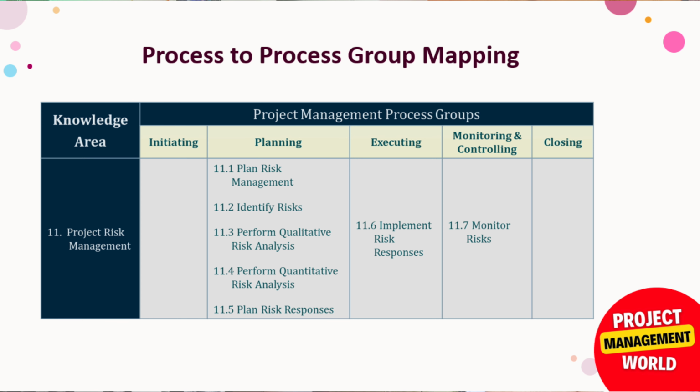So all these things we put into that plan, which is called the risk management plan. So this second process, we list out all the risks, we identify the risks, and at the end of this process we have a risk register with us. In this process we create a risk register which will have the list of the risks that we can see as of now in the project. That may be threats or opportunities, whatever it is.